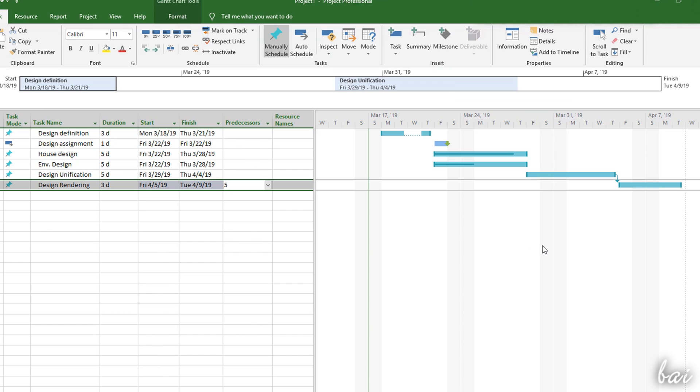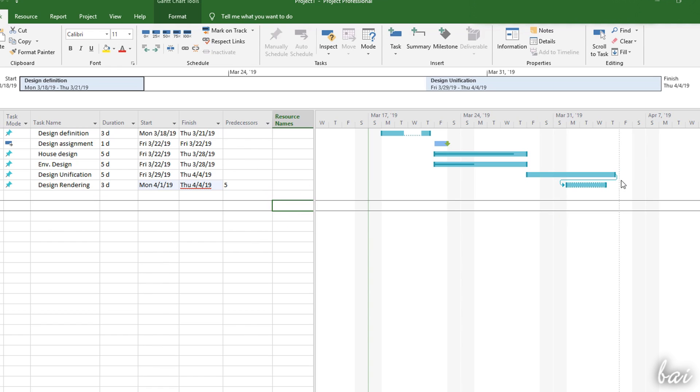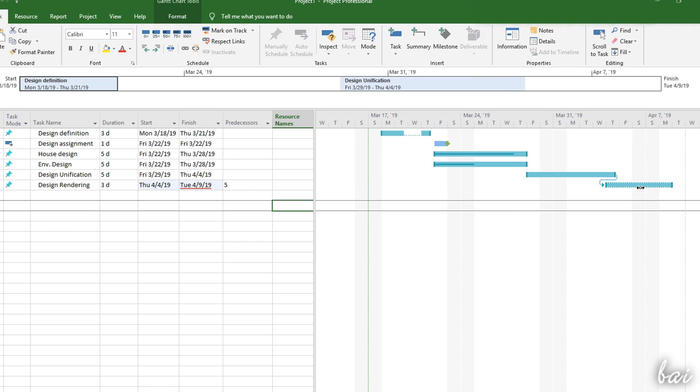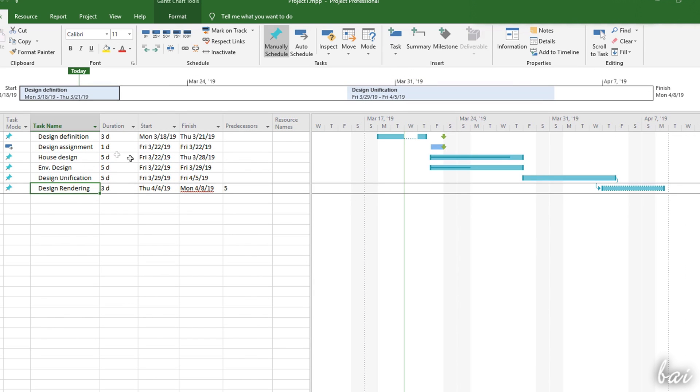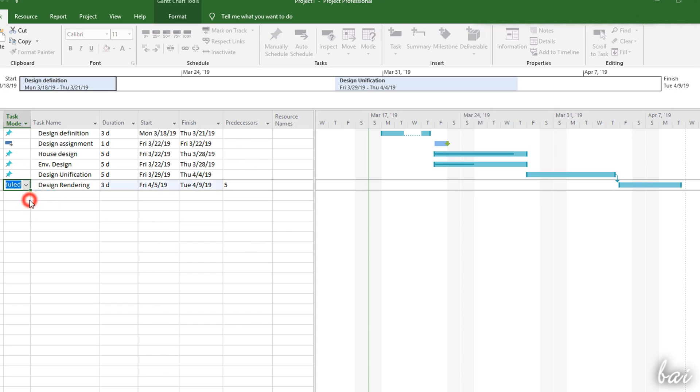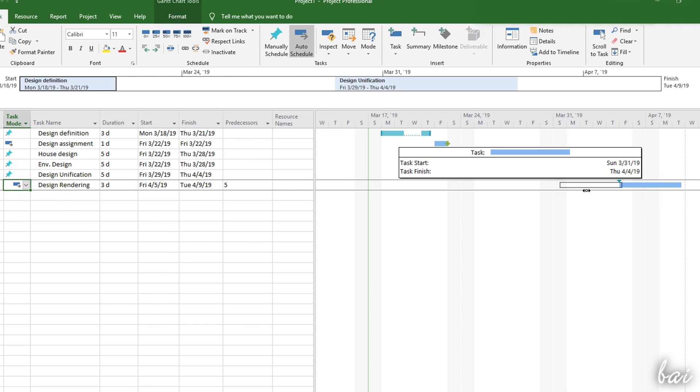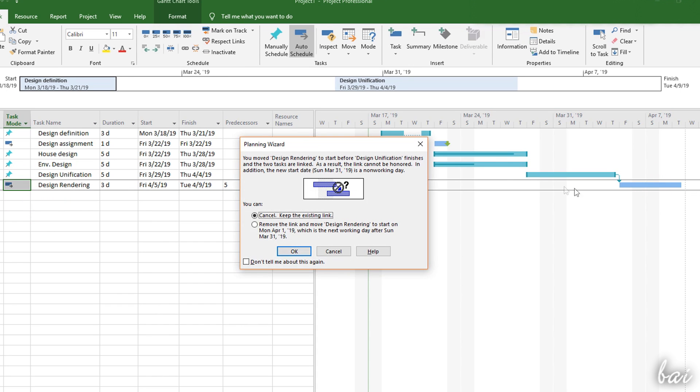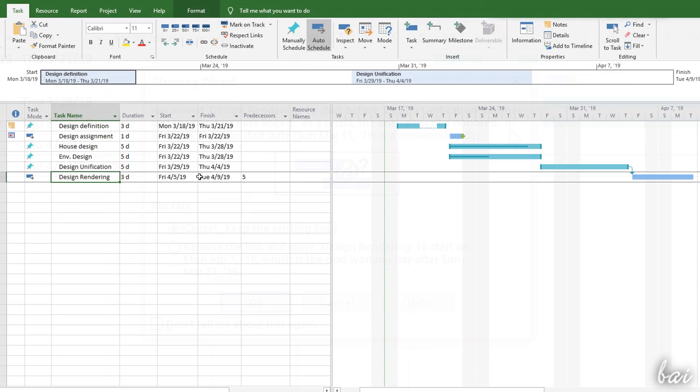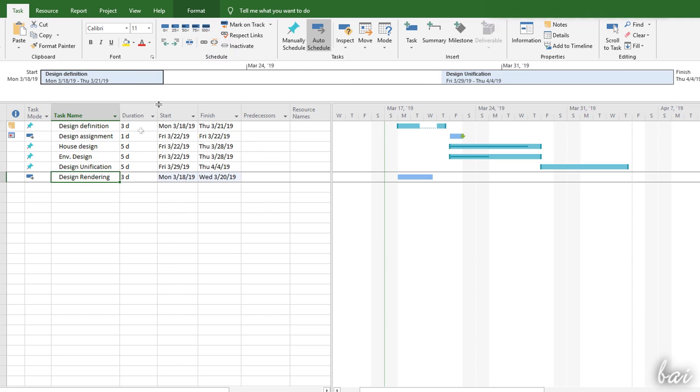Pay attention when moving manually scheduled tasks that have links. In case the new schedule does not respect the kind of link, you will get errors on the task, shown with dashed contours. You can use Respect Links under the Task tab to correct the schedule of the current task. In the case of auto-scheduled tasks, these are solved automatically by project, depending on your choice from the Planning Wizard. To remove any link from the selected task, use Unlink Tasks.